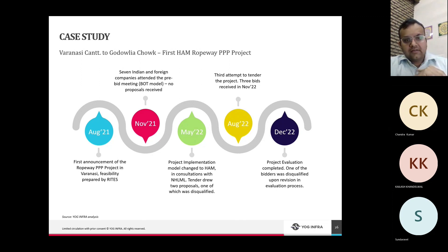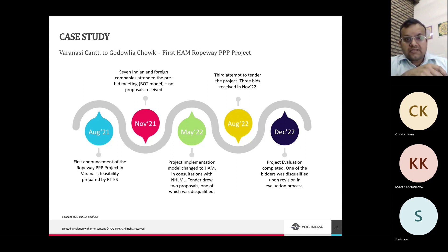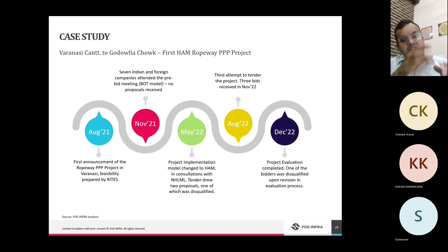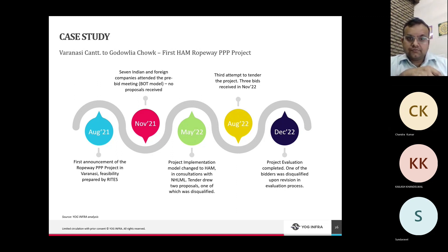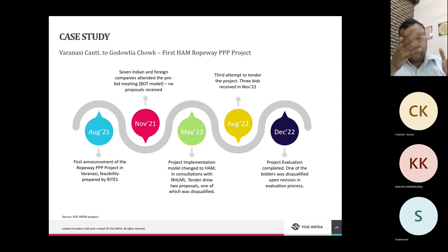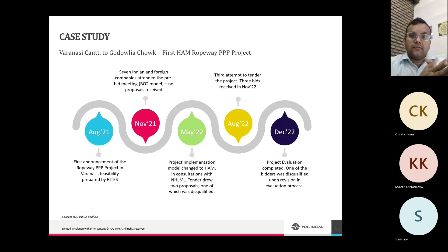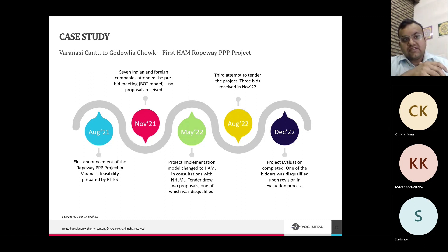In May 2022, the UP government worked with NHLML to change the project implementation model to HAM and re-tendered. Two proposals were received but one was technically disqualified, leaving a single bidder — insufficient to award. The tender was floated again in August 2022. Three bids were received in November 2022 and evaluation was completed in December. Initial technical evaluation passed all three bidders, but one — GR Infra Projects — was later disqualified due to debarment from NHAI projects for one month following an order passed on 8th November. Two bidders remained.